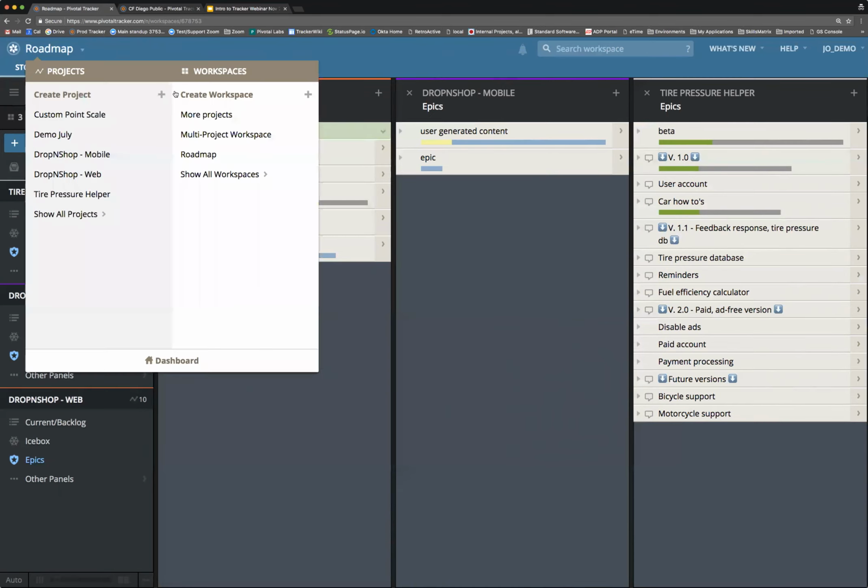You can just put a simple block label on, but this feature lets you go in and, let's say that this story was blocked by the one underneath it, I could copy that ID, go in here, add that this story was a blocker, and then you can immediately see that the story is blocked and that this story is blocking it. So you get these visual indications of what's going on.